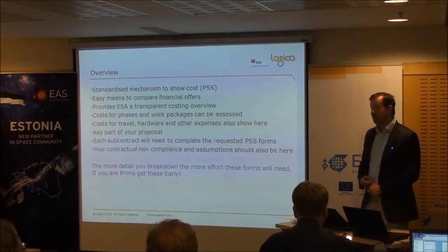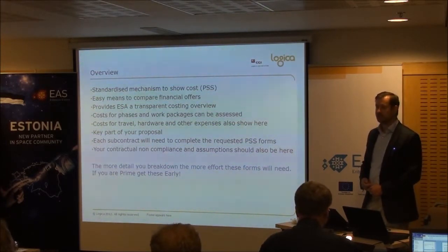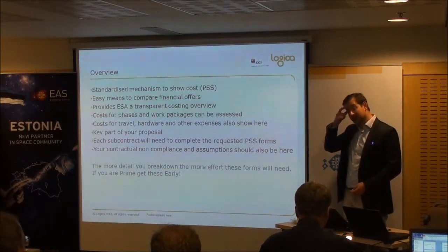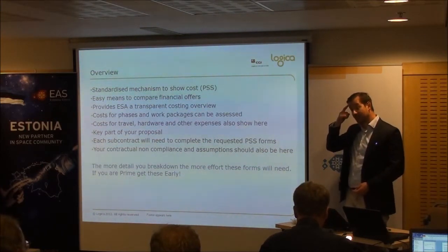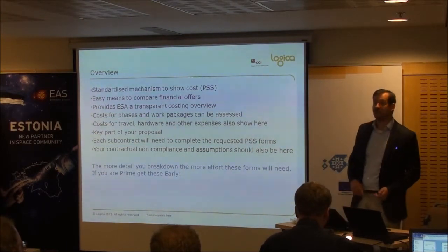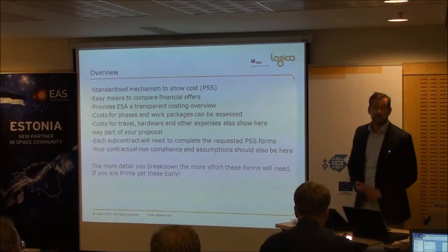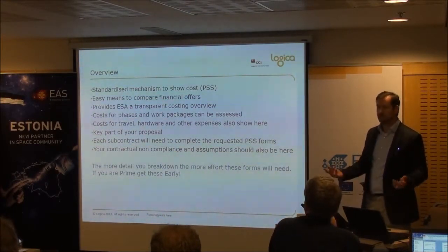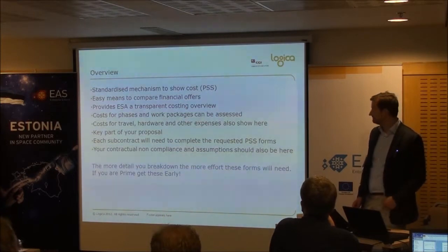You're also going to need to put any contractual non-compliance or things like any assumptions you made. As I said before, quite often you will apply assumptions. In the case of a PEX, whether you'll need to do that or not depends a little bit. If you're likely to reuse another piece of software and you've never seen it before, you probably have to make some assumptions about it. Otherwise, be prepared to take the risk.